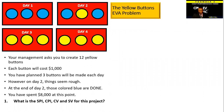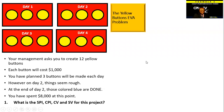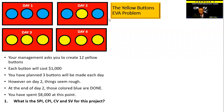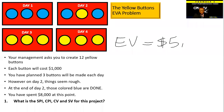So we already know the story. You're meant to be doing this project, and at the moment your earned value — we've already taken a look at this in previous sessions. You've only done five buttons, so your earned value is $5,000. And your actual cost, which we call actual cost of work performed, is $8,000.